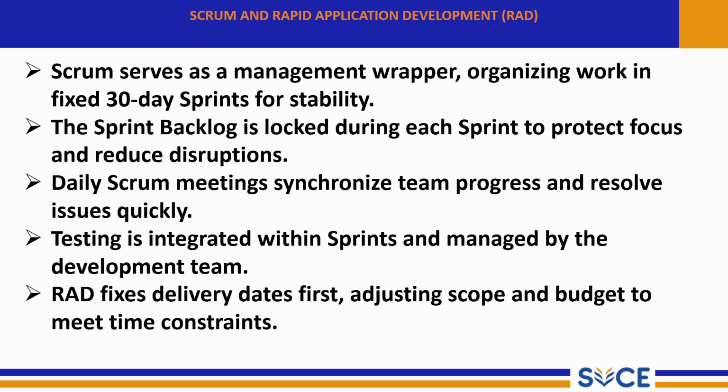Rapid application development fixes delivery dates first, adjusting the scope and budget to meet the time constraint. Rapid application development is another agile model that prioritizes speed. In rapid application development, the delivery deadline is fixed first and then scope and cost are adjusted to meet the deadline. This makes rapid application development suitable for fast moving projects with strict timelines.